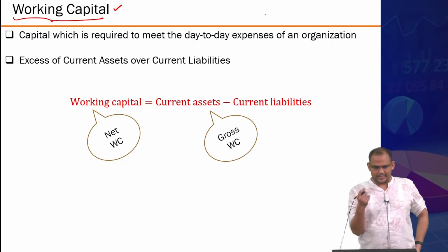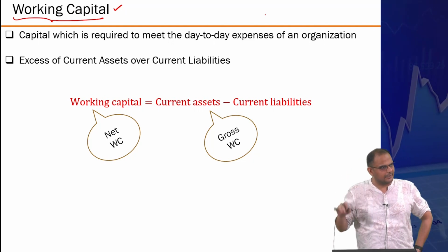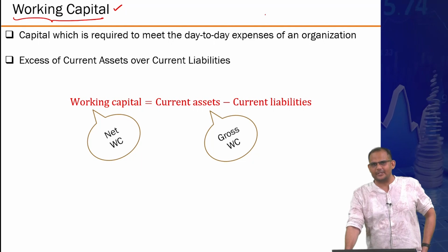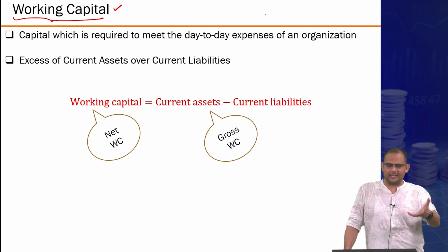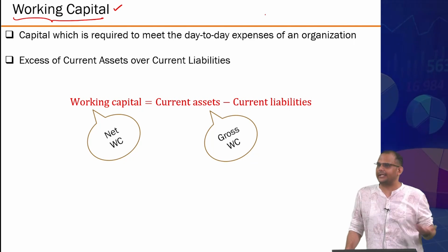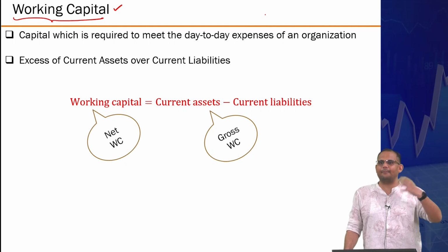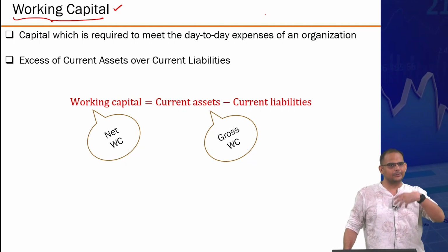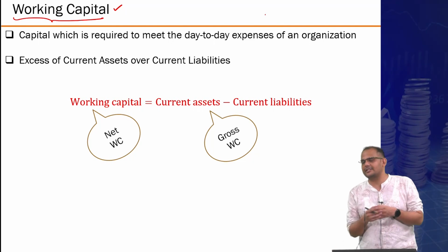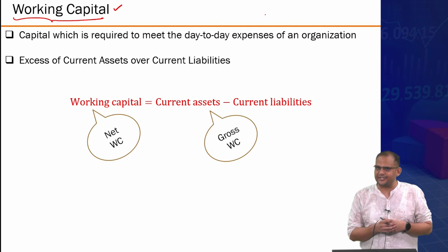So we have already discussed briefly about this topic called working capital. Anyone, any idea what working capital is? During project execution, this money is not finally used or consumed in the project, but you need this money primarily because there is a delay in you getting payments from the client versus you need to pay your suppliers the money.